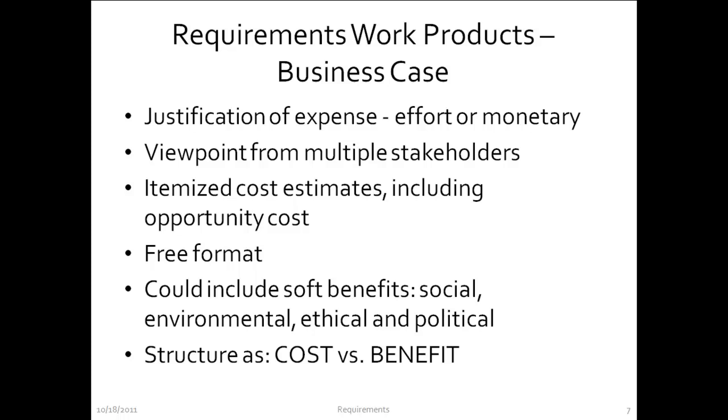Now, at this time in the life cycle of the product, it is unlikely that people will have a clear idea of either the cost or a specific idea of the value. So the idea here is to capture it at a high level. And as the project evolves and you understand better what to build and what that system will do for you, you refine both the cost parts of it as well as the benefits part of it. Okay, note that the cost parts may be in dollars and cents, money or effort.